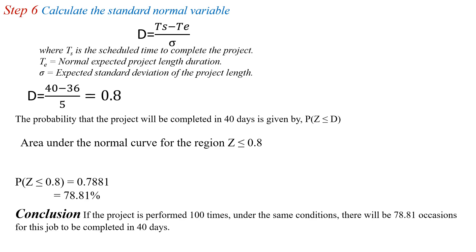In conclusion, the probability of the project being completed in 40 days is 78.81%. If the project is performed 100 times under the same conditions, there will be a 78.81% chance for the job to be completed in 40 days. This is the complete solution.